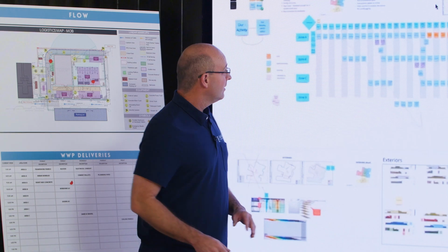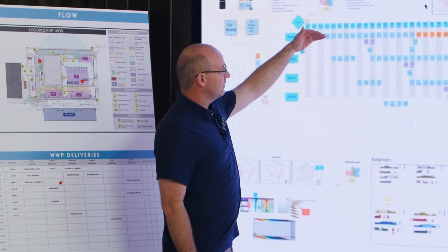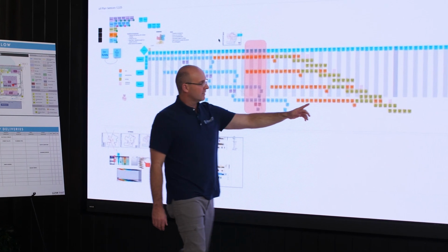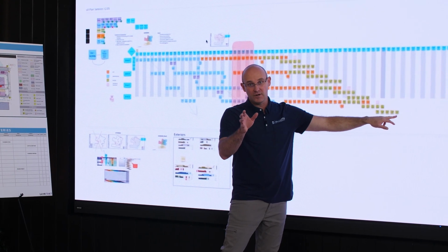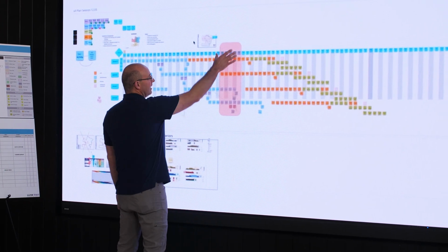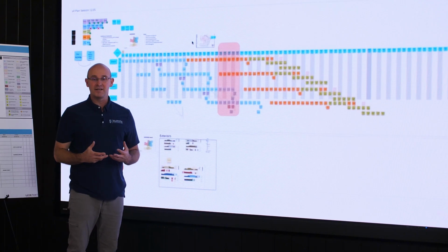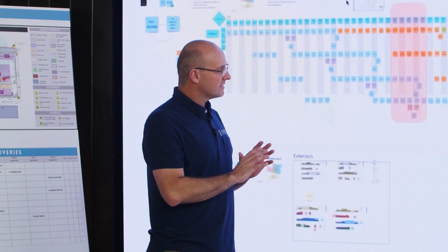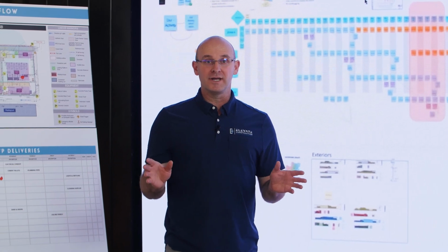And then at the end, I will make sure that all of these, the pull plans, basically the sequences, are copied throughout all the zones. And I will confirm that this end milestone has been hit properly, and if we've done it right, we will have gained buffers. And one thing that I love is that if there's ever an area that we need to go dig into a little bit more, we can highlight it and sidebar it and go make sure that this entire train of trades in a phase works for everybody and that it's been vetted.